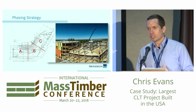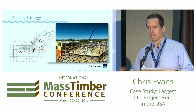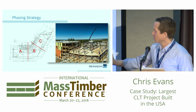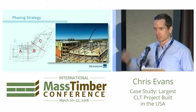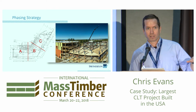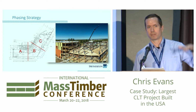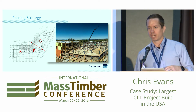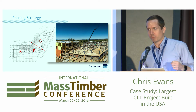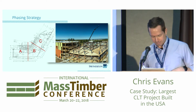We broke apart all the shop drawings similarly. So there's section A shop drawings, section B, section C, so we could take the detailing off the critical path, and we could do the stuff that's repeatable just going straight up. What that meant is we could start a flow of work consistent with high-rise construction, where you have another trade coming on each week following you through this building, and you can get a smaller crew started earlier. You gotta keep in mind, we're at the peak of a construction market. Everything's really busy. Workers are hard to find right now.